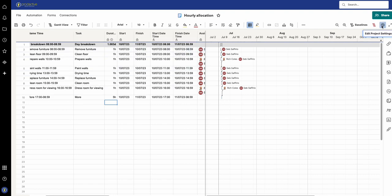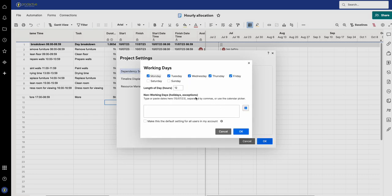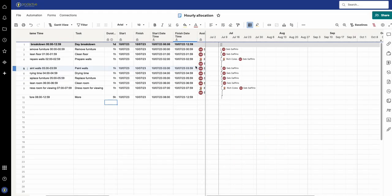If I now change the timings and say that the working day is longer than 12 hours, so if I turn it over to 13 hours, it's going to automatically start the day at midnight. That's kind of one of the settings here. I appreciate this is a bit of an edge case for people who might be looking at these hours, but it can be useful on certain settings.